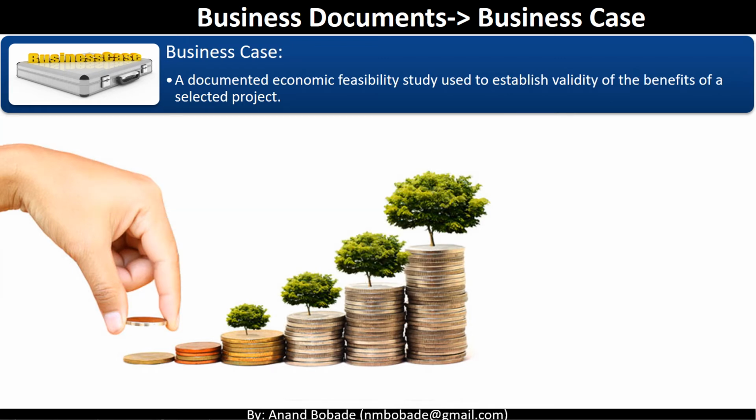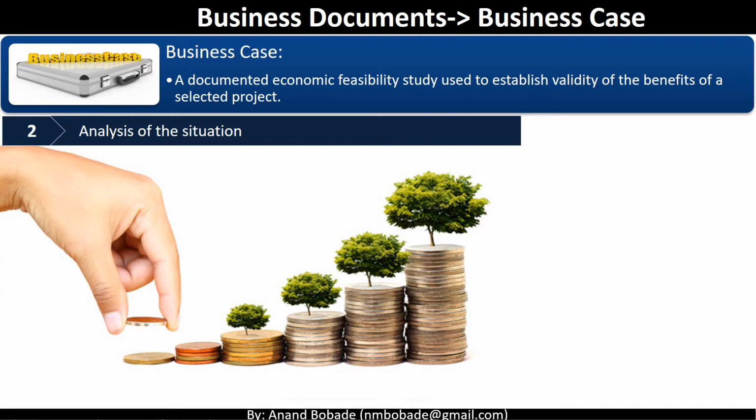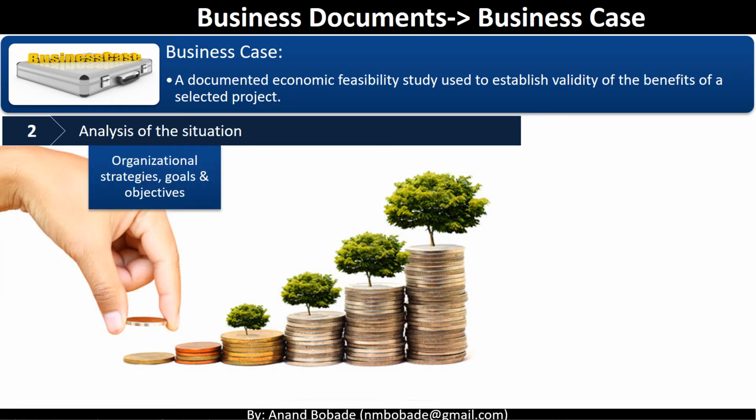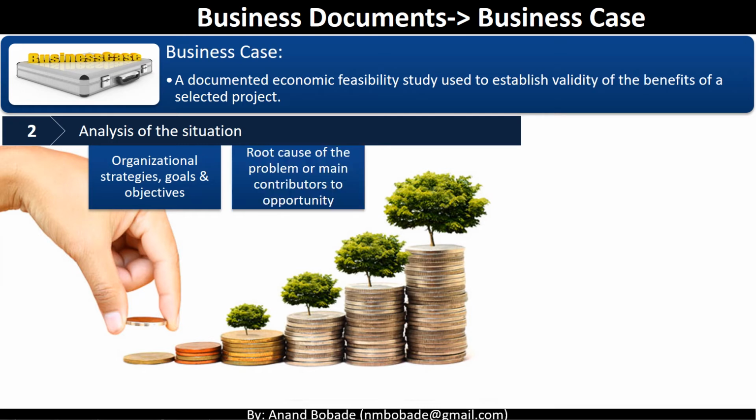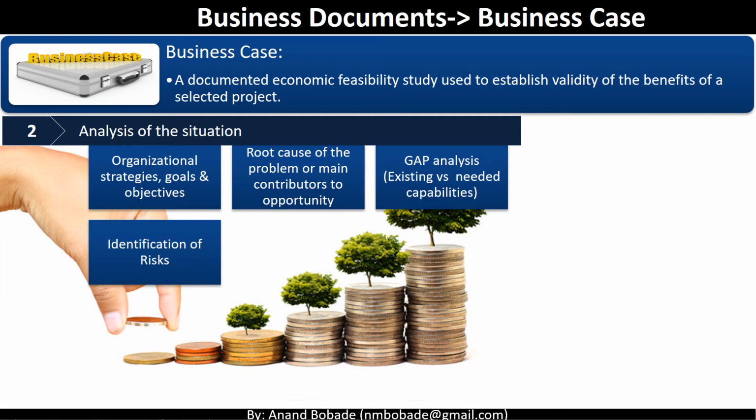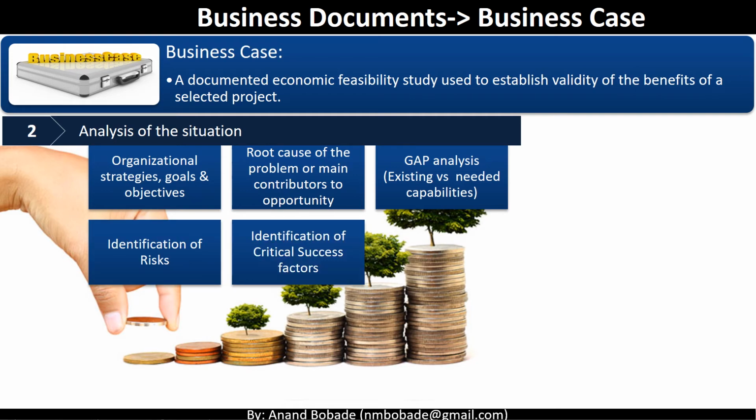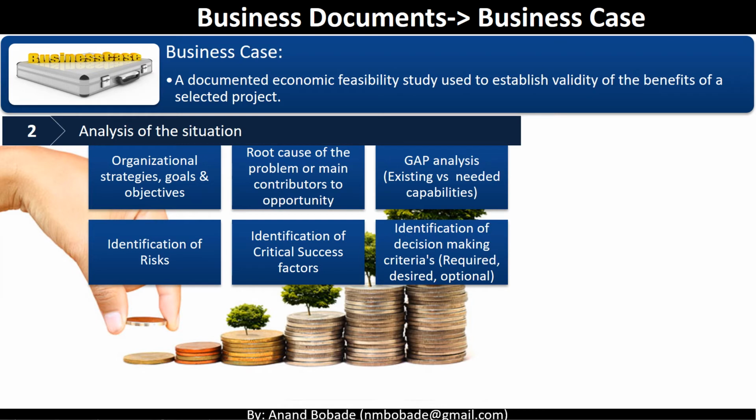The business case will contain analysis of the situation. This is the current situation analysis. It will have analysis of the organizational strategies, goals and objectives. Analyze the root cause of a problem or main contributors to this opportunity. Gap analysis, existing versus needed capabilities. Identification of risk. Identification of critical success factors. Identification of decision-making criteria, for example, required, desired, or optional, and options analysis.